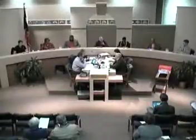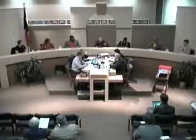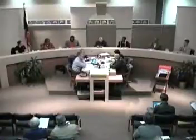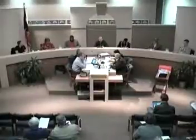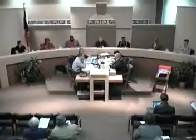Thank you. I had a couple of questions asked of me right at the beginning, so I'm just going to pop them off real quick. Is there a published schedule of the time frame for the various renovations? From where we're at now, when are we expecting to finish this out? I think the finish out will come in the next 30 to 45 days, and I'm talking about my end of it. The furniture side of it, I can't answer to, because I wasn't involved in that. But I think Casey's moving at a pretty good pace, and we have a change order coming up next that we need to talk about. It has to do with quality, not quantity, on carpet. It's coming along. Actually, it's ahead of schedule where Casey and I thought it would be.